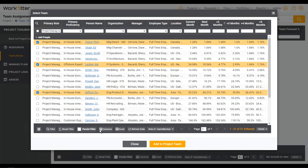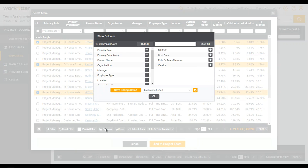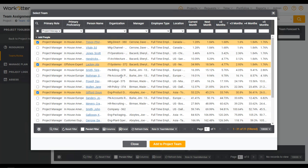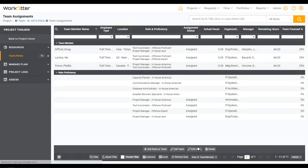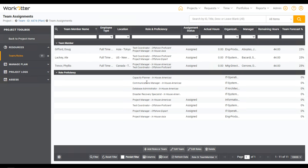You can make additional selections here as well. Also, don't forget that you can select columns — there are a lot of different columns you can add or remove to help you best find the team that's right for you. When you're satisfied, add it to the team. We now have Doug, Allie, and Phyllis, as well as some additional roles that will eventually get staffed. Those roles with no assigned name will go directly to the resource manager's homepage, and they'll have a way to staff these directly should they wish to.